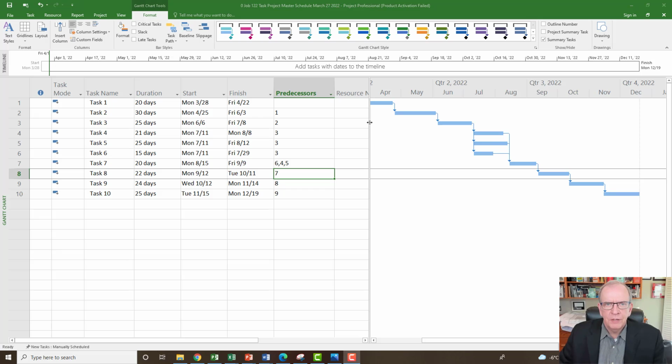In the construction field, we very often have projects that run more than a year, several years, and while Microsoft Project has a number of baselines you can save and reset, ideally it's best to have your files organized into folders so that you can actually track how well they're doing and how well they did at certain points. If somebody has a claim, or you have to do what we call a contemporaneous analysis and go back and check how the project was doing or what caused the delays, etc. So it's a pretty easy process, but it takes a little bit to get your head around.